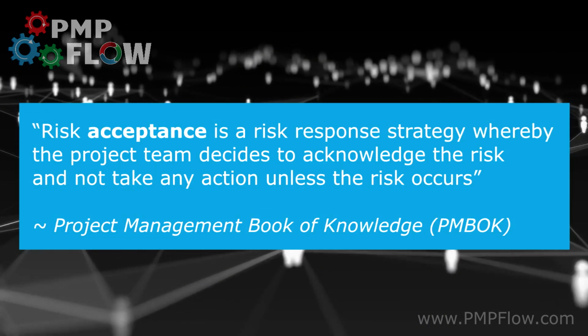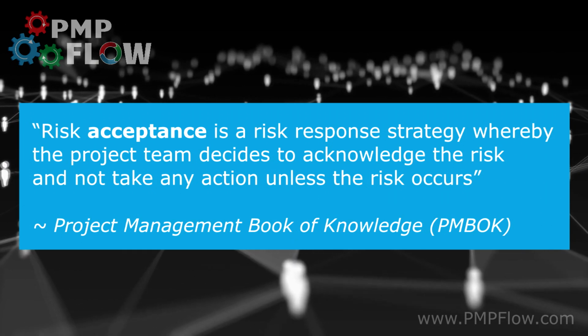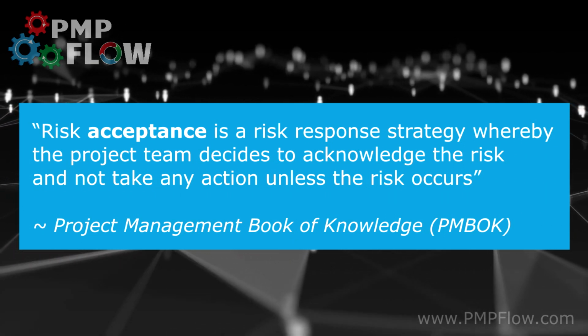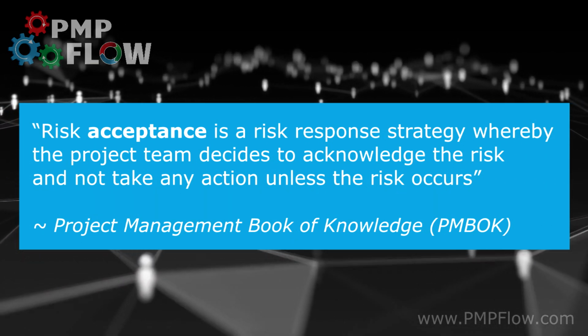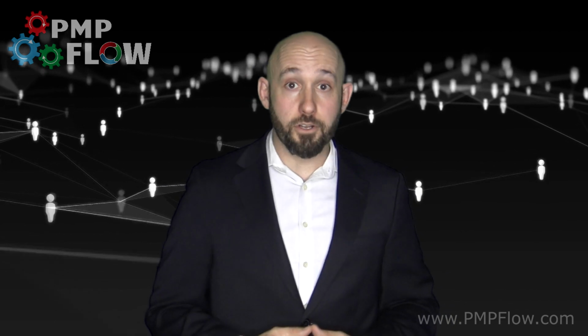Accept. Risk acceptance is the risk response strategy whereby the project team decides to acknowledge the risk and not take any action unless the risk occurs. Sometimes you may exhaust all possible options and find that accepting the risk is your best solution. In the case with a construction project, you may have to accept that a hurricane could occur during your project. But it's very important that you come up with contingency plans on what you do if that risk does occur.